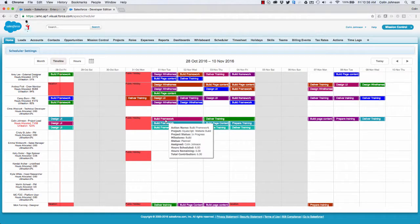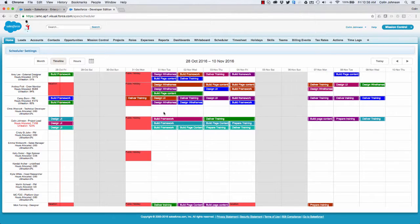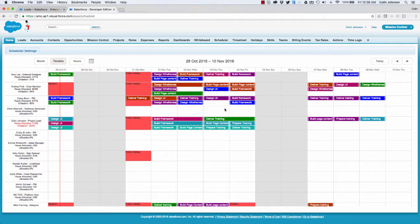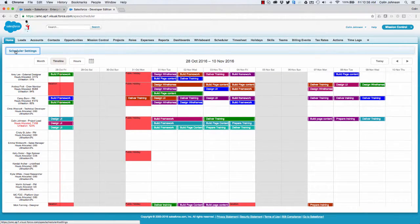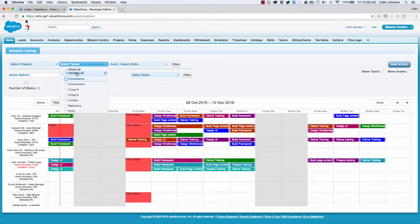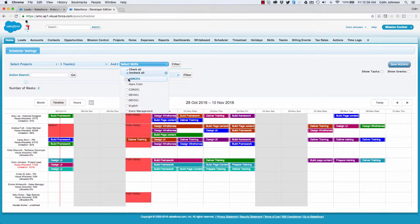So what I'm able to do is actually drag and drop and reassign this work to other people, and I can see Chris has got lots of availability so I could give it to Chris. However, I want to make sure I'm going to give it to someone on the right team with the right skills profile. So I can filter that list down and say, alright, only show me people that are on that team.